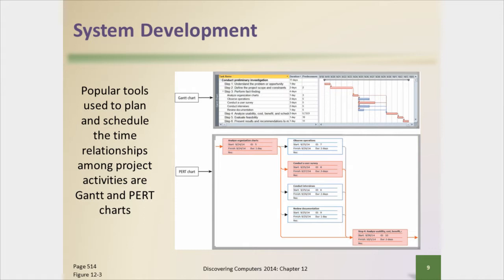One of the things that I think intimidates students is they look at a lot of the reports that you can get out of Microsoft Project, and they think that this requires an awful lot of work. But you can really boil it down to some very basic information. If you look at this right here, this is really a work breakdown structure. So you list the different steps that you've got. You've got subtasks. You've assigned durations to them. You've identified predecessors, where task 2, step 2, must be completed before you can do the next step.